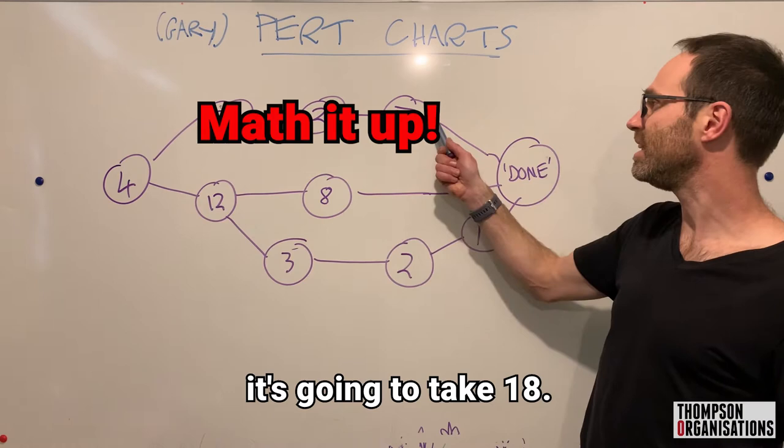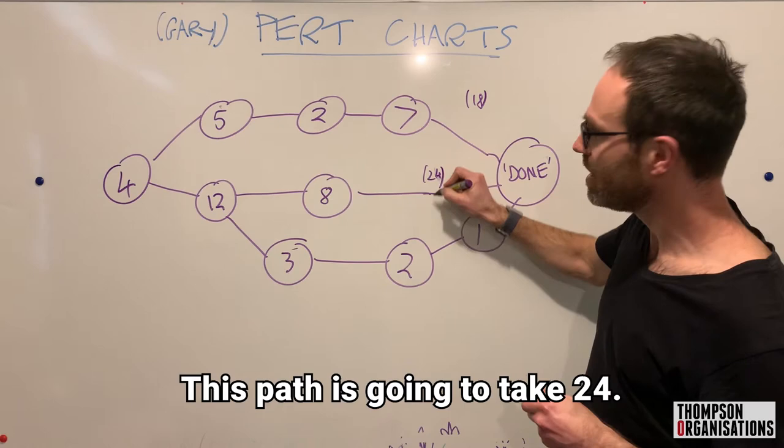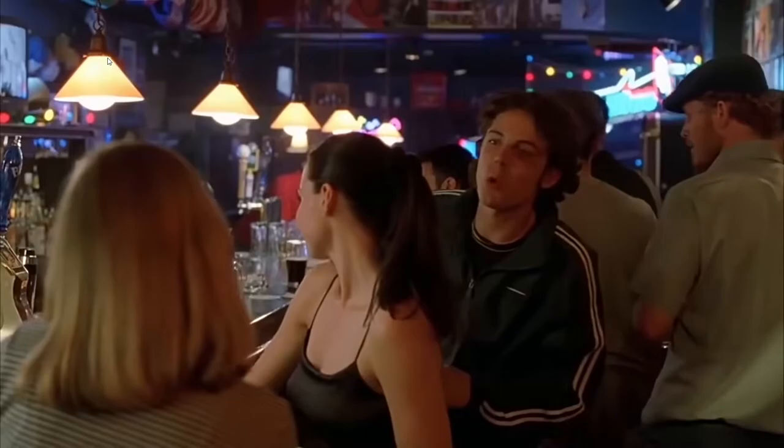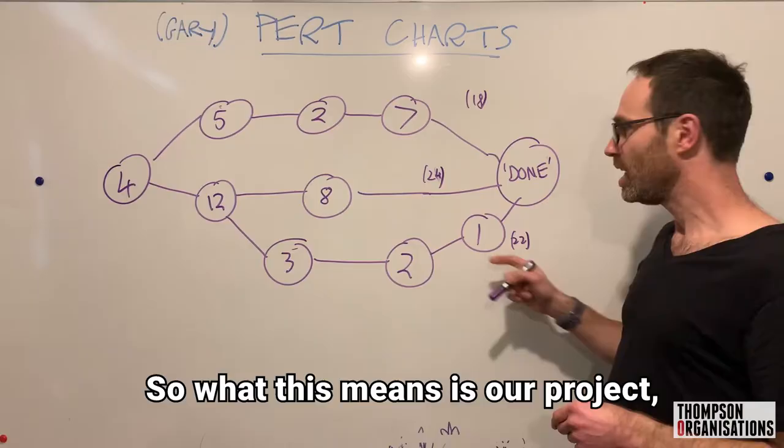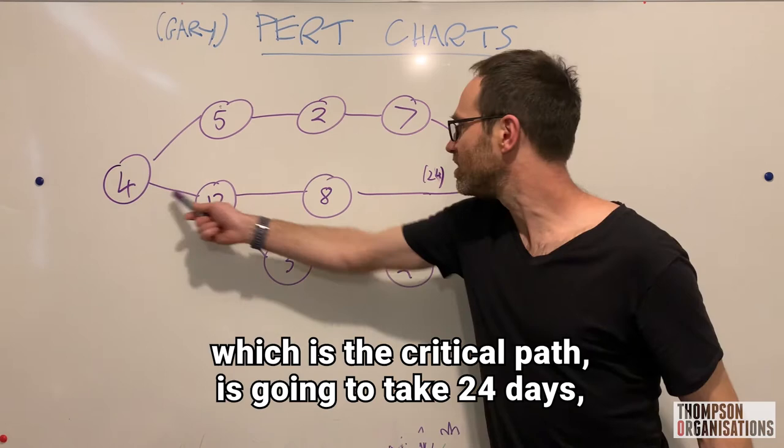This path is going to take 24. And this path along the bottom is going to take 22. So what this means is our project, which is the critical path, is going to take 24 days, but that's the longest path. 4 plus 12 plus 8 gives us 24 till done.